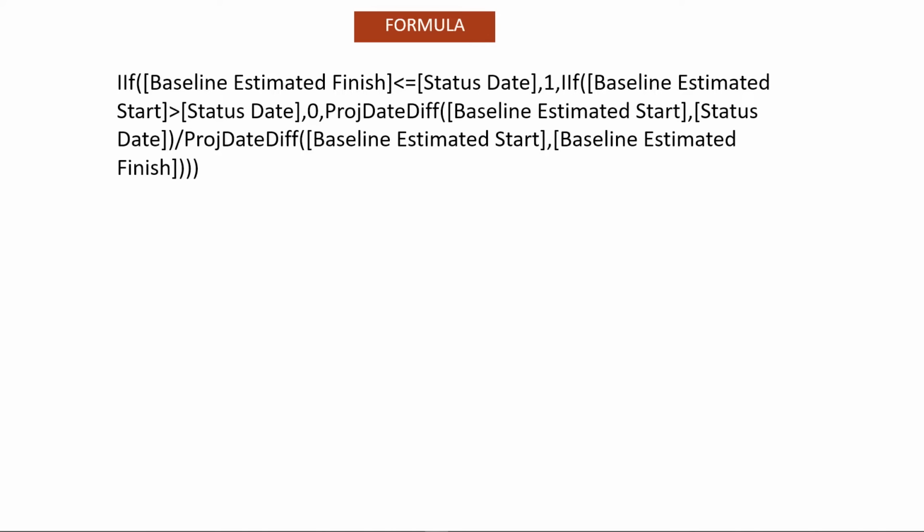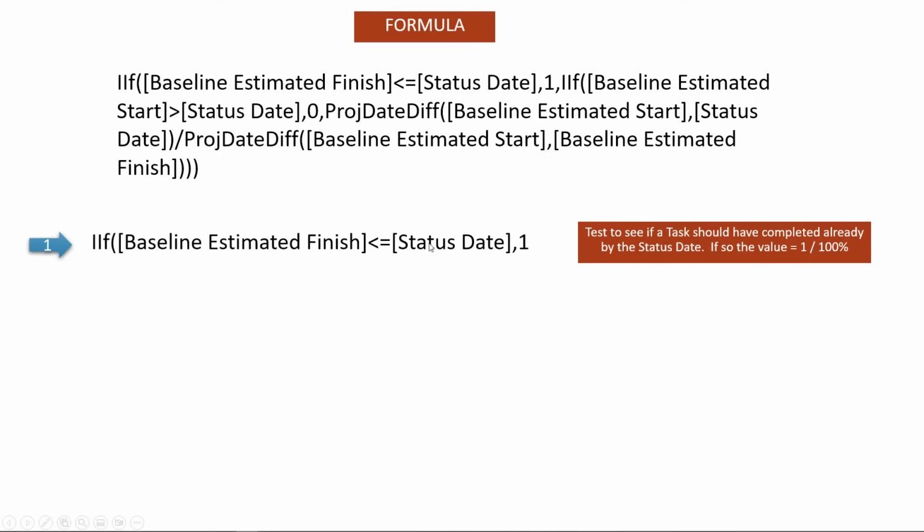It's quite basic, and it does three tests. So we essentially want to see, firstly, and this is the first part of the formula, whether a task should have completed already by the status date. And that is the IF function there.